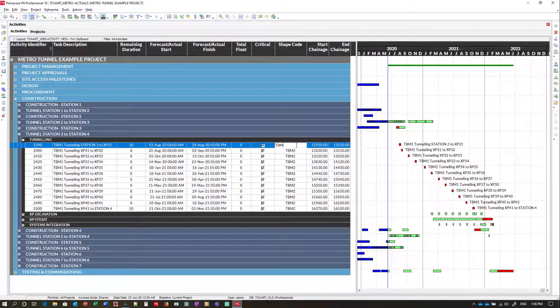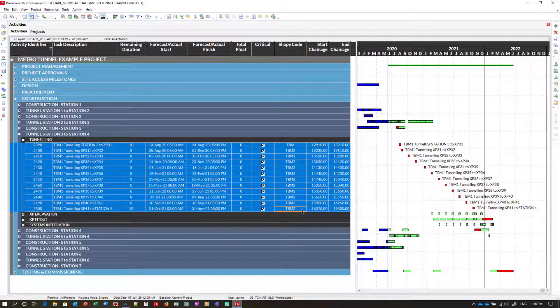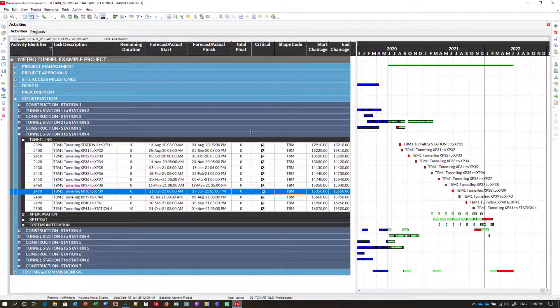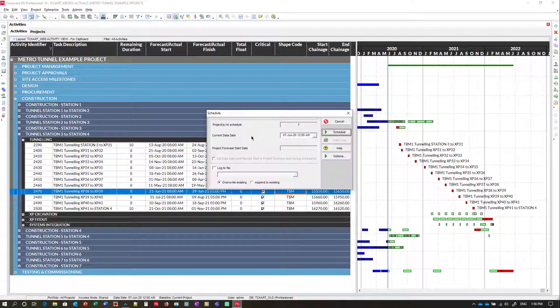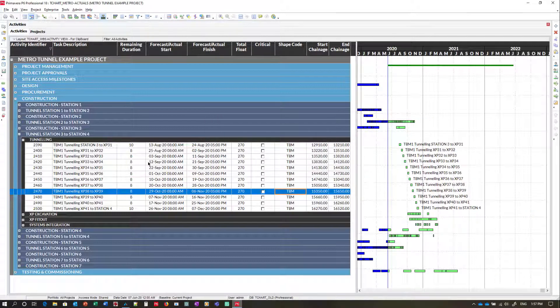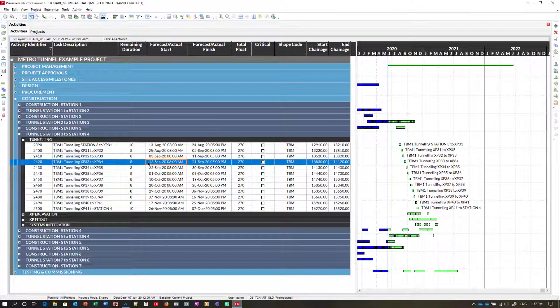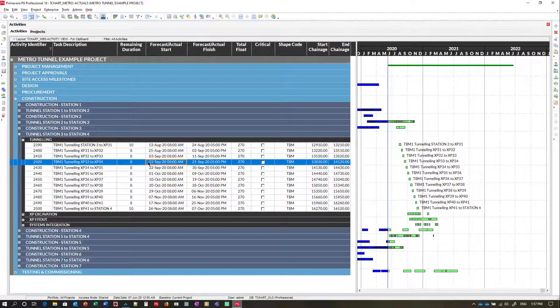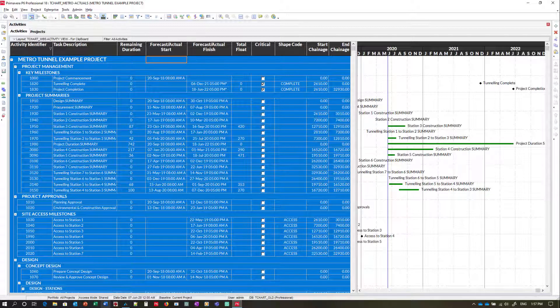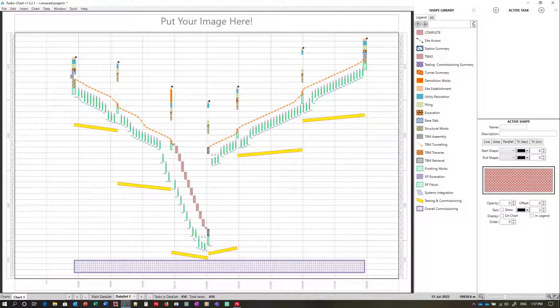And press F9 to recalculate the schedule. After making changes to the schedule we copy and paste in exactly the same method. Control A to select all the data. Control C to copy. And we move over to TurboChart.